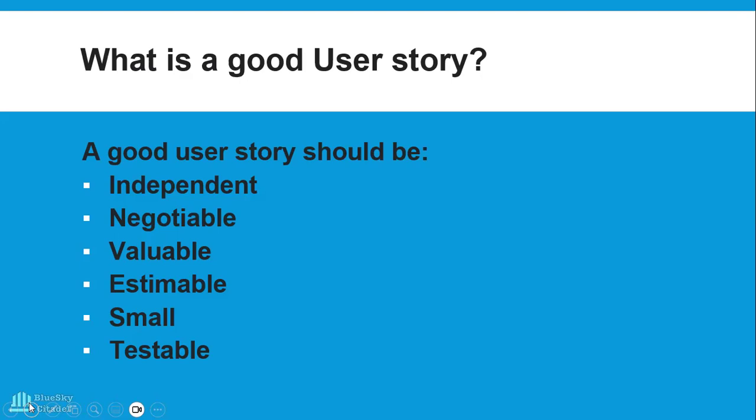Your user story must be written in such a way that it can be tested, because how else will you know that you've completed the job that you've been asked to do? It has to be tested. When we get to the acceptance criteria, you will see what we mean by this. So you write, for example, gain access into the house, right? If that's your user story, how would we know that you've gained access into the house? We should be able to test it, isn't it? So there'll be some steps that can help us confirm that this person has actually gained access into the house. Hold on to that example. I'll show you how we can flip it and make it a user story as we go on in the session.